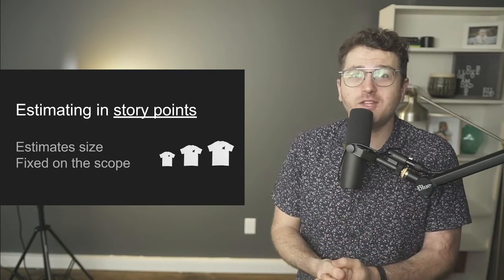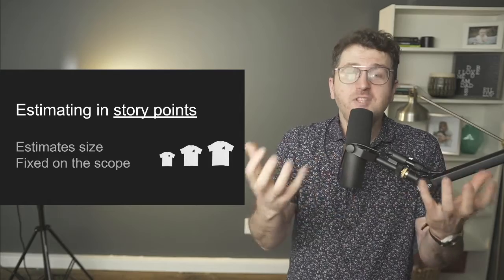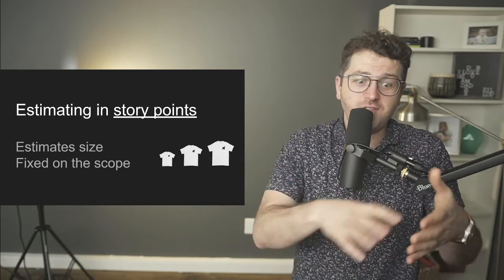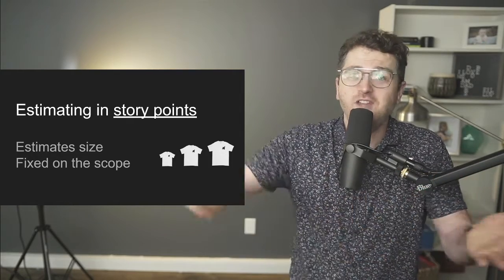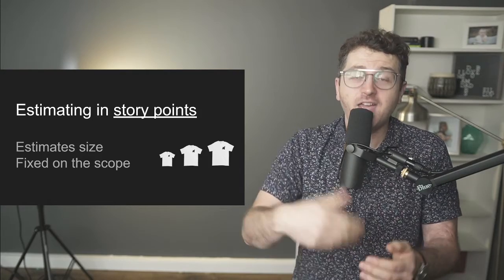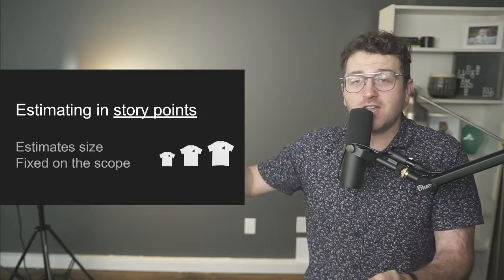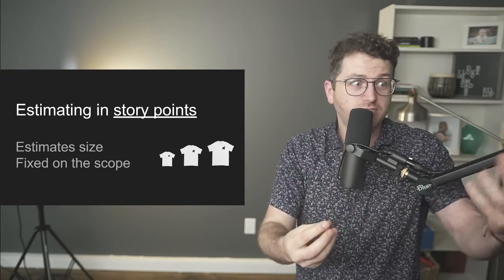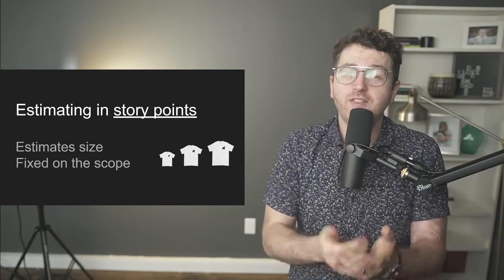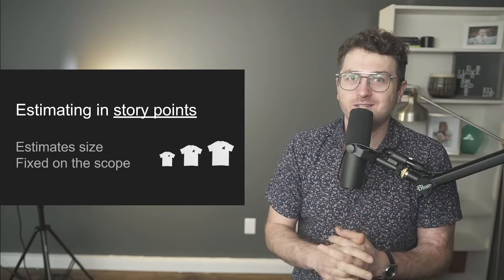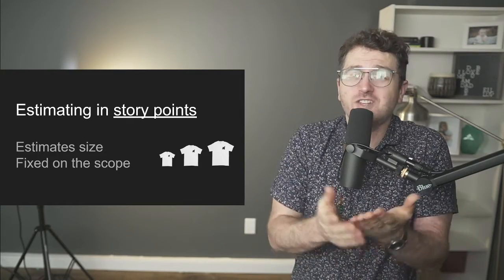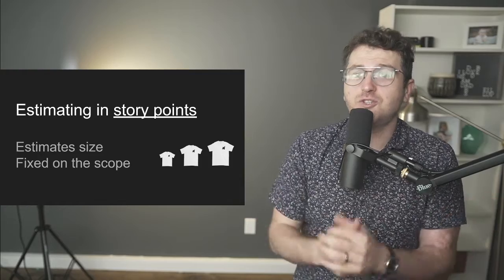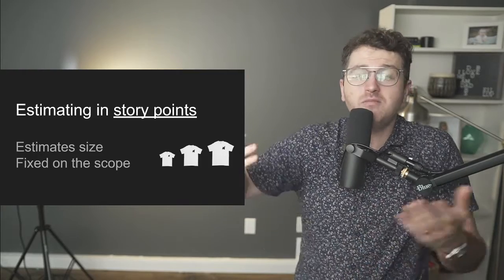And let's say you know that you have 5 items over there, you juggle around with the things, you put them in order, and you just give numbers from 1 to 5, basically. And then you identify a pattern. And any other feature that shows up, you're going to say, well, it's way more similar to this, which means that it's the same value as that. And there you go. It's way easier to do estimations in this way because they're just a few numbers that you're getting used to using all the time. And if it's way bigger, you just break it down.